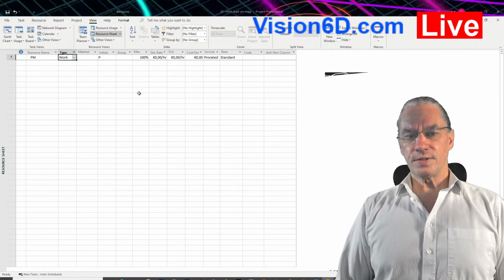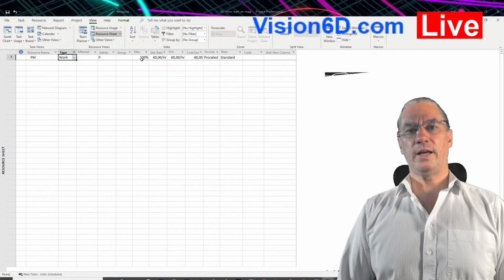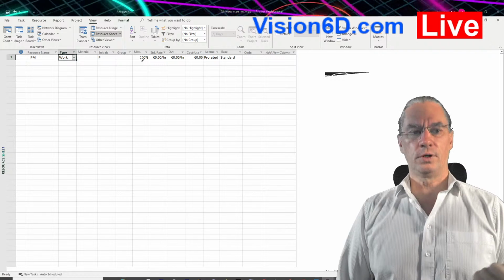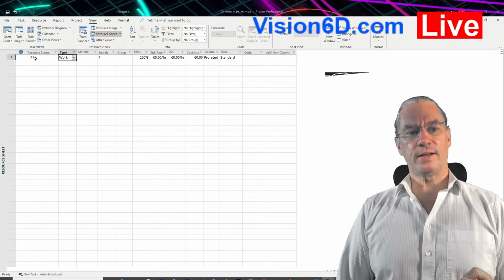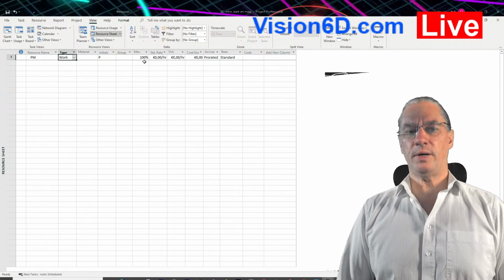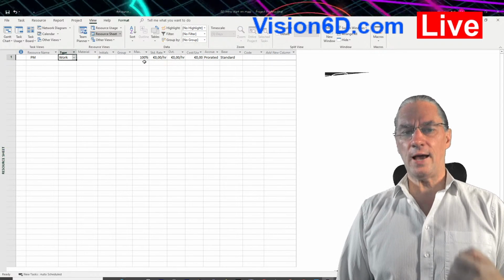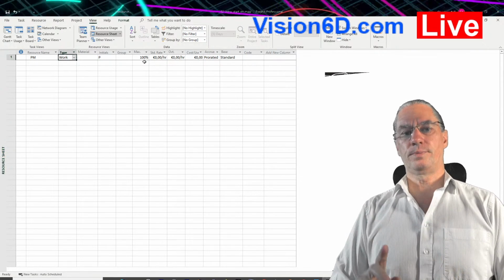After that, there is a column here, which is the maximum unit that you can use in this project of the resource. What does it mean? It means that, for example, PM, as it is defined by MS Project by default, is working 100% for this specific project.